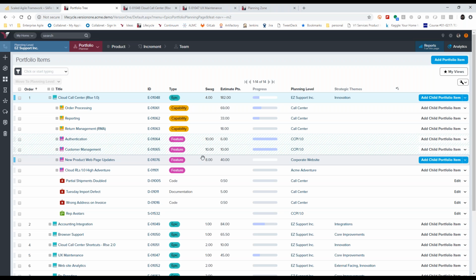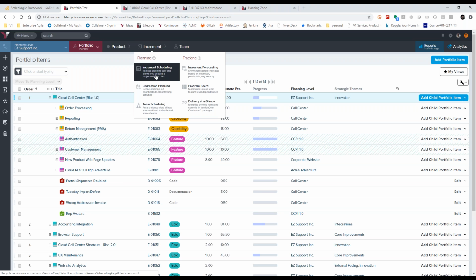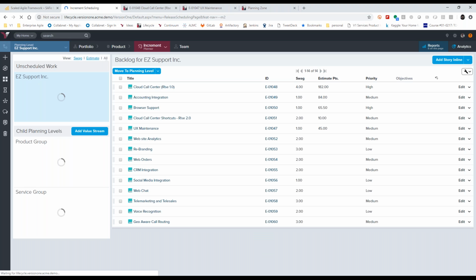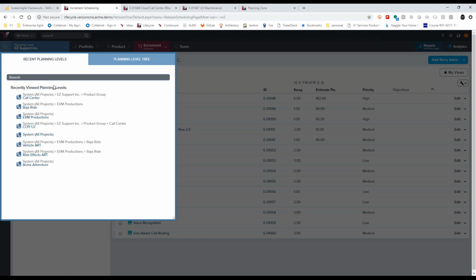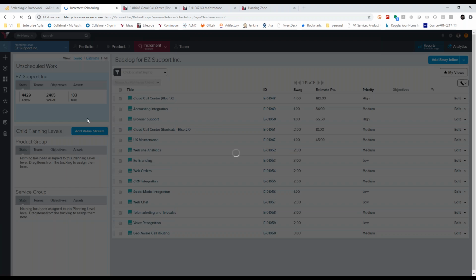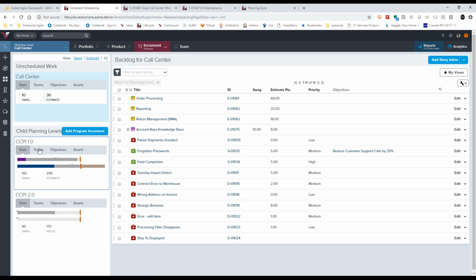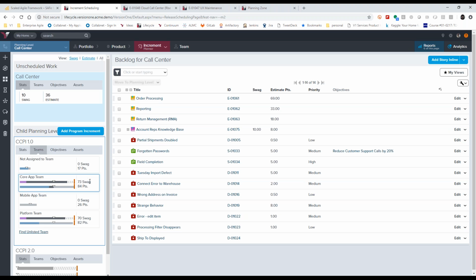disparity or variance between the different teams, which is why when we talked about the increment planning, we have the teams commit to their velocity so that we can focus on ensuring that we are not over allocating at the team level. So as planning is occurring, we are appropriately matching the demand to the team's estimations, right?